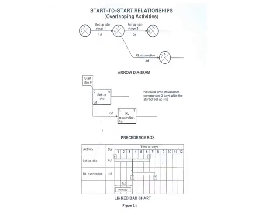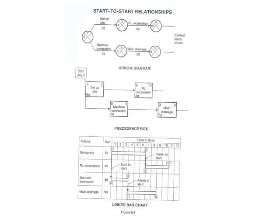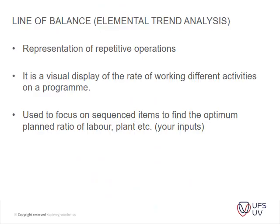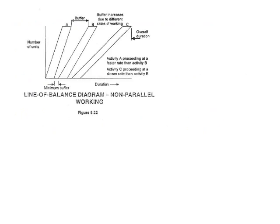Cook and Williams also explains your finish-to-start relationship and link bar chart relationships, which is basically what we already looked at but explained better. You will need to be able to explain start-to-start relationships, finish-to-finish relationships, and start-to-finish relationships. Then line of balance is your elemental trend analysis - it represents repetitive operations and is a visual display of the rate of working across different activities on a program. It's used to focus on sequenced items to find the optimum plant ratio of labor, plant, etc.